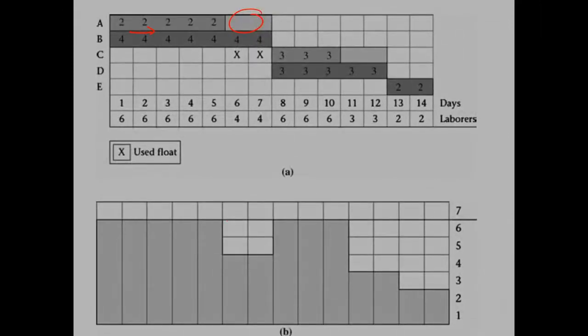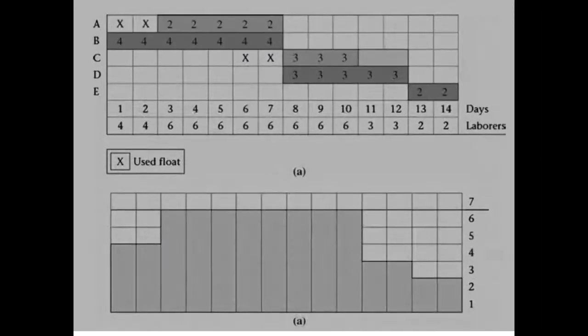So here you can see we have got a bit of a trough here, and we don't like these peaks and troughs. So in this, we are starting slowly, and then we have hired and we are working with a consistent number of people, and then slightly down. So this is much like a typical S-shaped situation where the work starts slowly, and then there is a peak in the middle, and towards the end it tends to slow down.